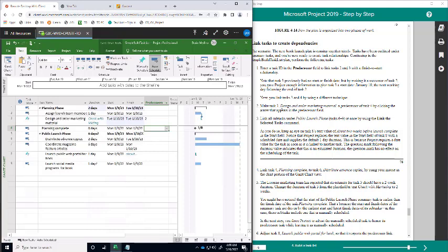Okay, now the next step is saying make task 3 a predecessor of task 4, and that I'll do the same, right? For now, I'll just key in the task ID, which is 3. How do I know that? Because it's telling me in the step. I'll just select this, enter, and then this task is now being preceded by task number 3.